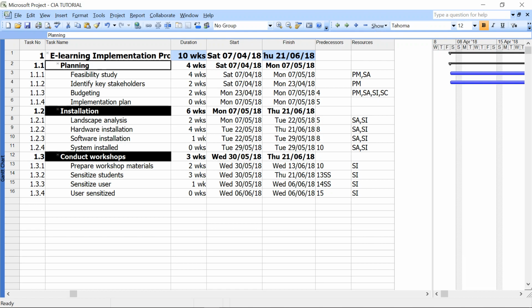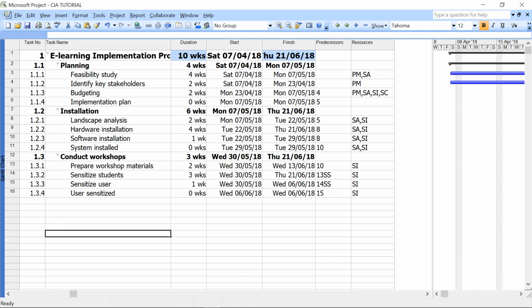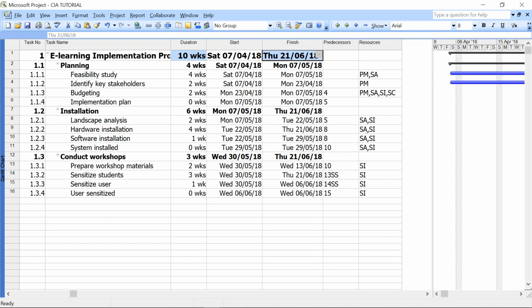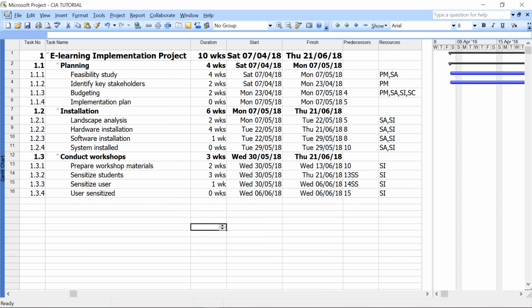Now when I indent, it's going to calculate the total time it will take us to finish this project, and that means we even have our finish date here. This is our finish date. Okay, Control save. It could show me the calendar. Okay, so on Thursday, July 2018. And this project will take 10 weeks. See how it just works out. Yeah, that's perfect.